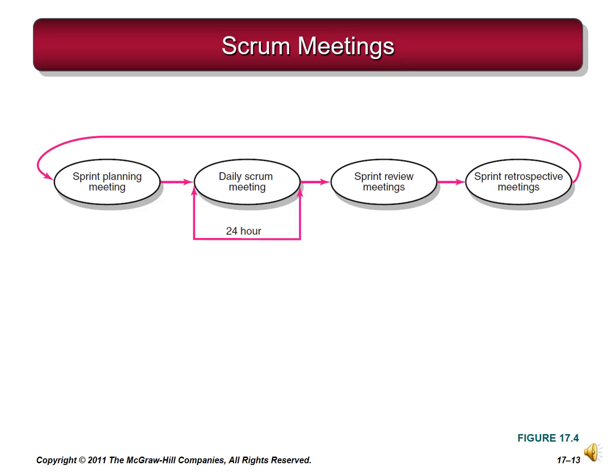If it is impossible to complete a certain key item within 4 weeks, the team works with the product owner to break the feature down even further into doable or deliverable pieces. All committed items are recorded in the product backlog. The team uses this backlog to prioritize specific work to be done and assign initial responsibilities. These tasks are recorded in the sprint backlog. Once the meeting has adjourned, the goals for the sprint cannot be changed.